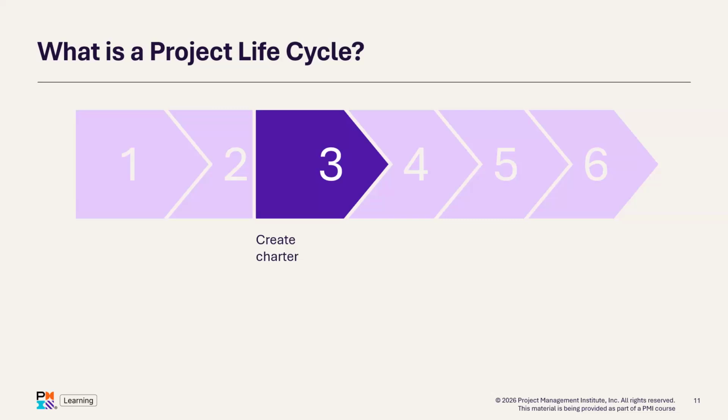But if a project is profitable, then it's viable. So we are going to evaluate all of that using appraisal techniques such as internal rate of return, payback period, and then present value, and all those metrics.